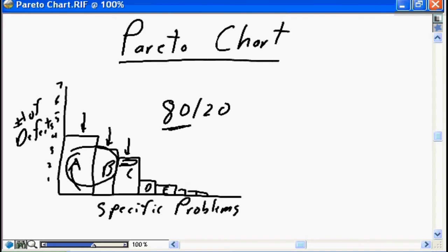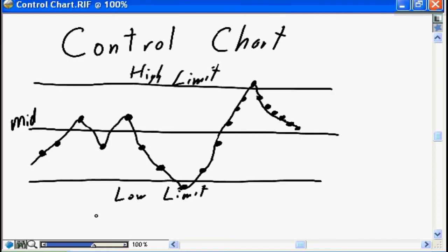But by doing that, we're dealing with the majority of the problems, and the others, the D, E, and so on. Yes, in an ideal perfect world, it would be nice to be able to eliminate them all, but because, as we discussed earlier in this nugget, time is money, there was always a focus on getting our project delivered as quickly as possible. If we can eliminate A, B, and C, we have dealt with the majority of the problems. So we're going to spend 80% of the time focused on the 20% of the problems, but the big hitters that's going to ensure our project is going to deliver more successfully, that in quality control, we're focusing our time in the right areas.